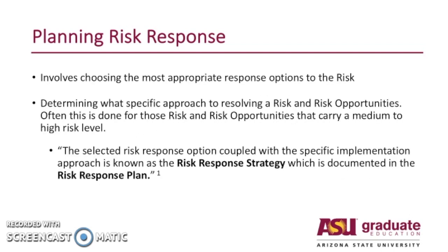It also involves choosing the most appropriate response options to the risk. Planning for risk response is determining the specific approach to resolving a risk and risk opportunities. It often is done for those risks and risk opportunities that carry a medium to high risk level.